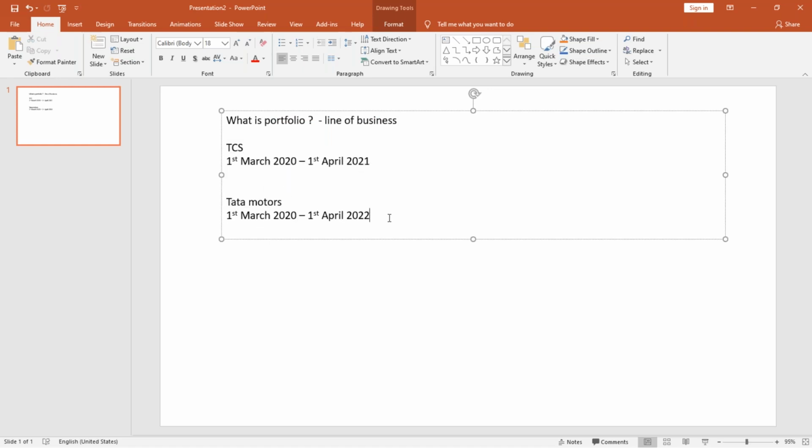Then in both the places you will have what? You will have planned budget, or planned cost, whatever you call it, planned cost I would say. And there will be planned effort, like how much manpower you need and how many days they will work and everything. Then you will send it for approval. Once the item gets approved, it becomes a project, and then the project execution starts.